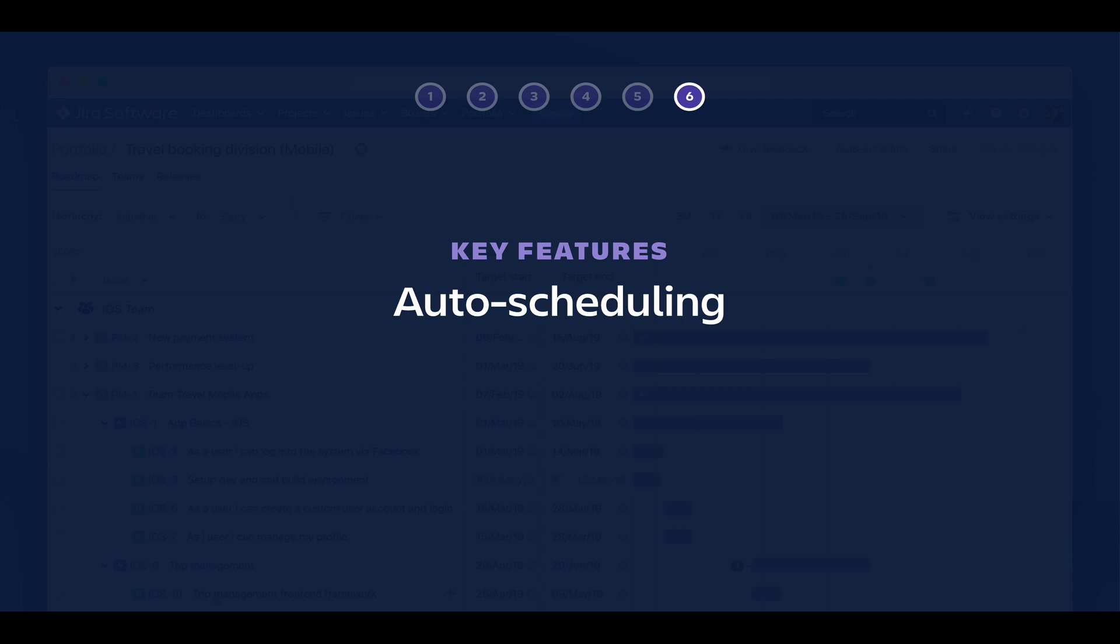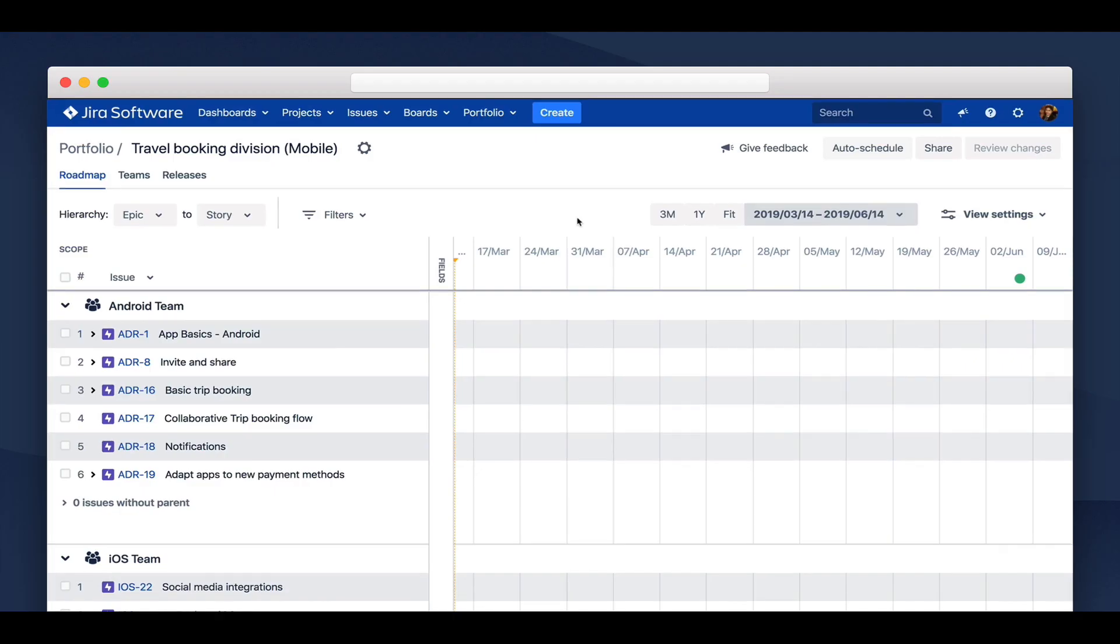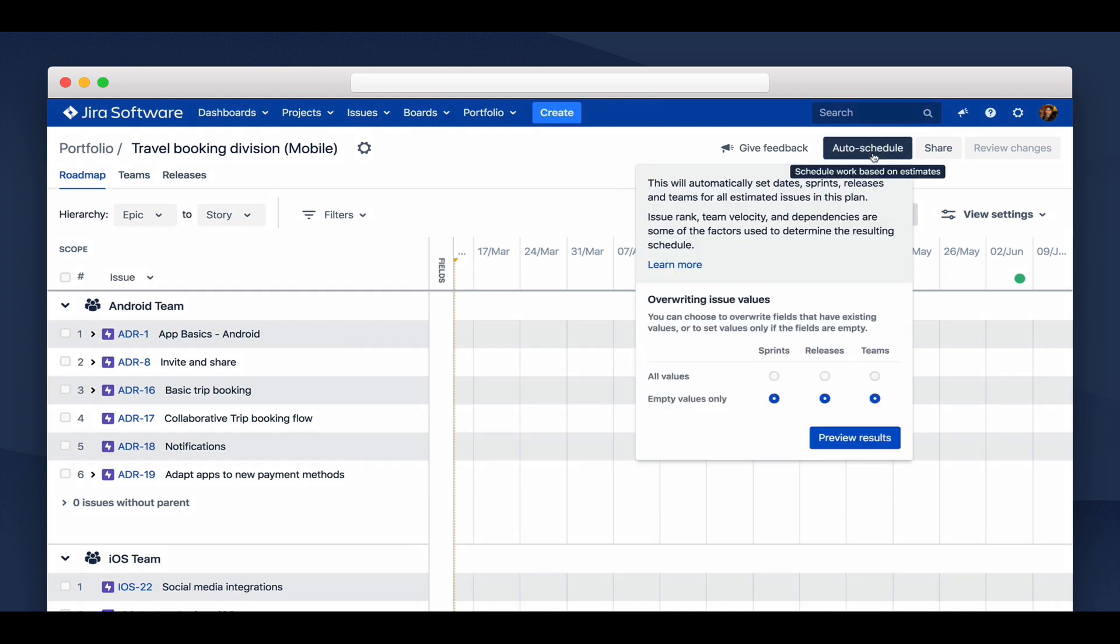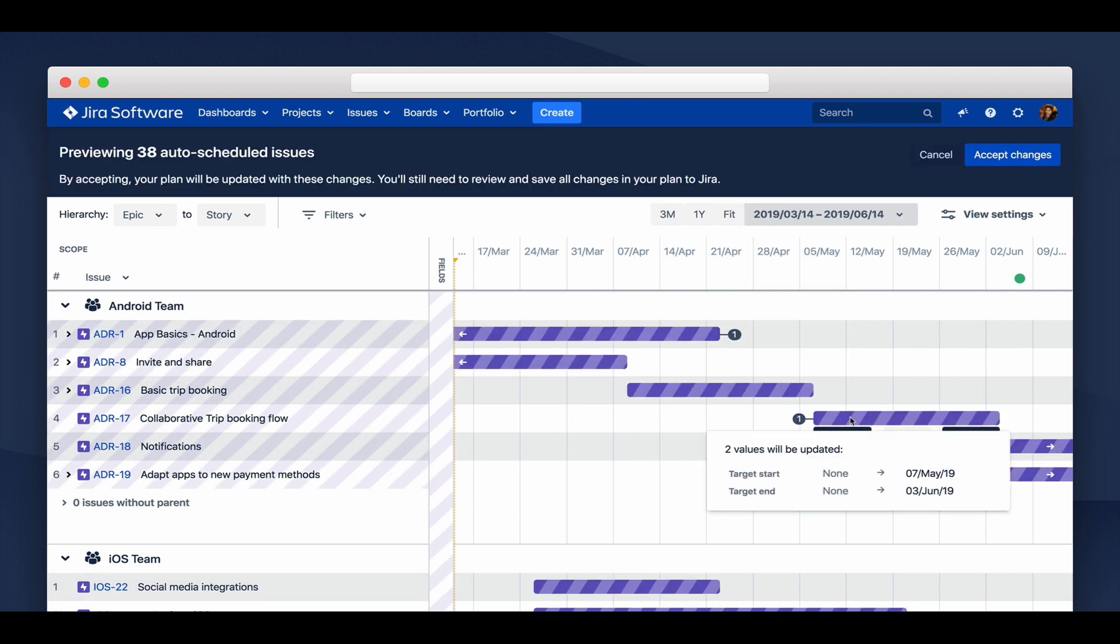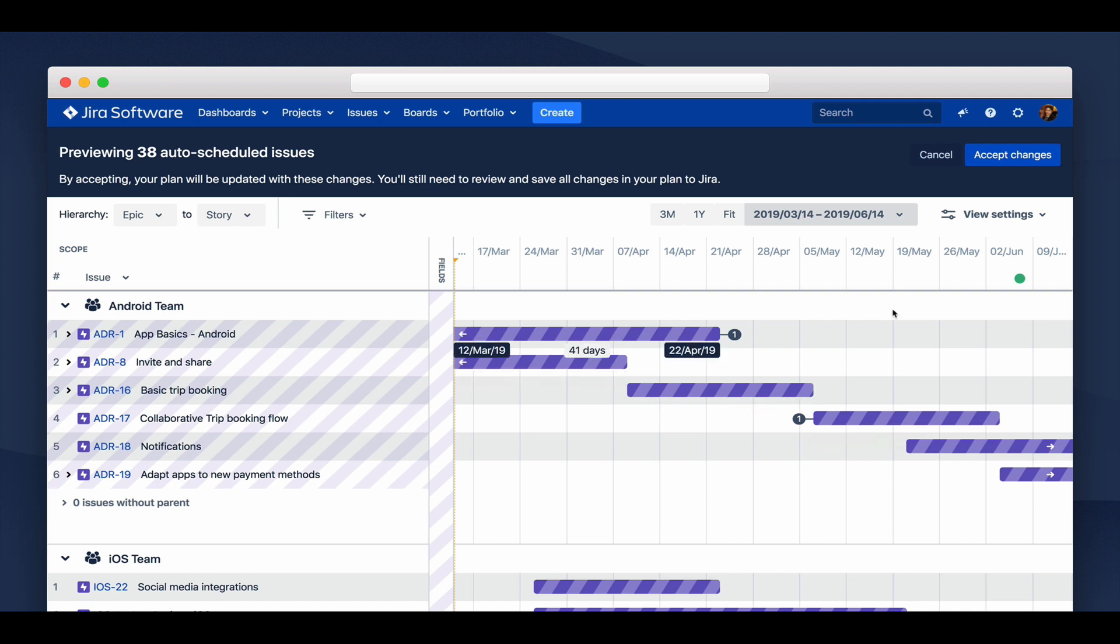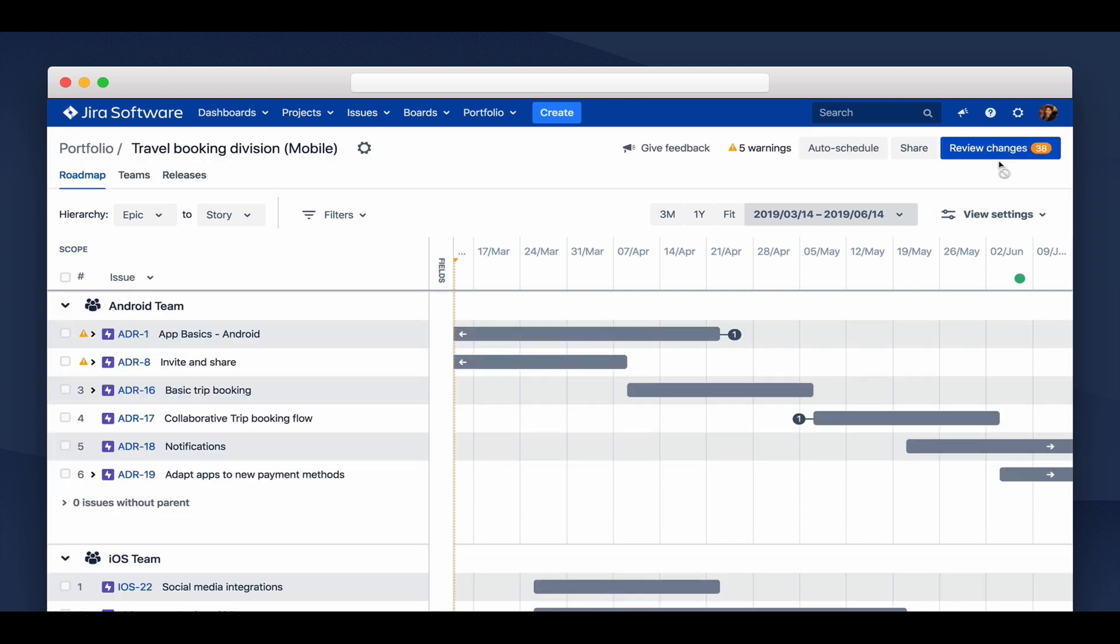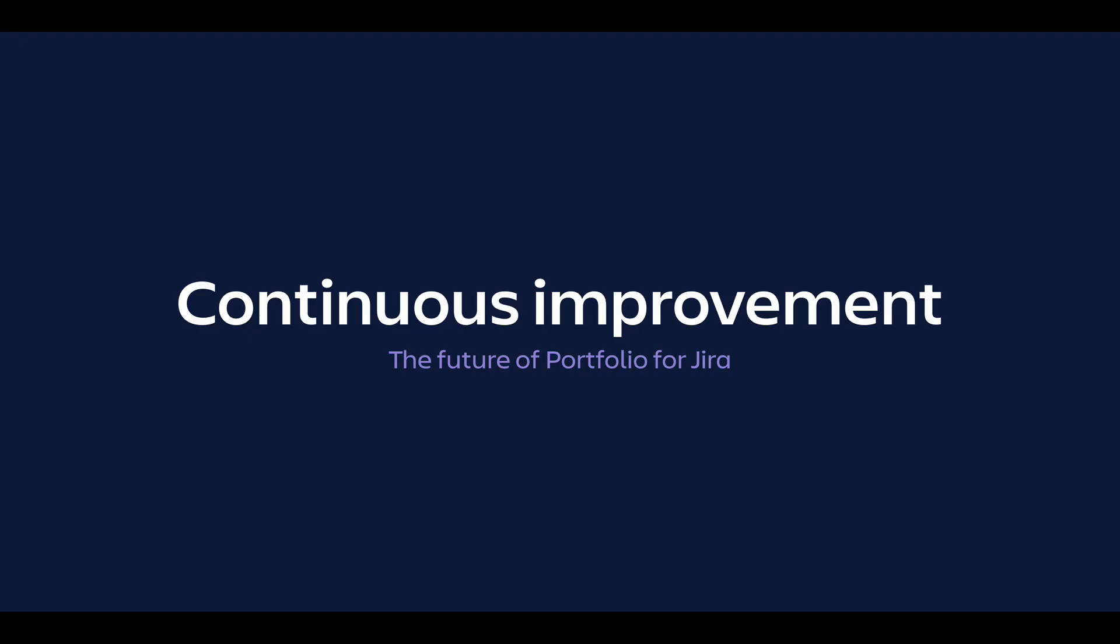And rounding out our list, for advanced users, we have a powerful scheduling algorithm that will allow you to auto-schedule your entire roadmap with a click of a button. So this is a major difference between Portfolio 2.0 and 3.0. The timeline on Portfolio 2.0 was entirely based on the output of the scheduling algorithm. You would provide the data to Portfolio, and when you click calculate, it would generate the schedule for you. Portfolio 3.0 has changed this quite significantly. You now have a lot more control to schedule the roadmap that you want, and Portfolio will provide you the data and insights that you need to keep your plan realistic. So we can ask Portfolio to auto-schedule our plan, and if we're happy with a preview of what the plan looks like, we can accept the changes. I know I've highlighted this point a lot, but trust me when I say that this is just the tip of the iceberg when it comes to all that Portfolio 3 has to offer.